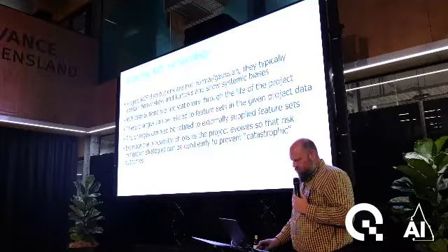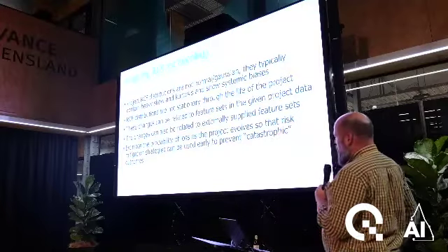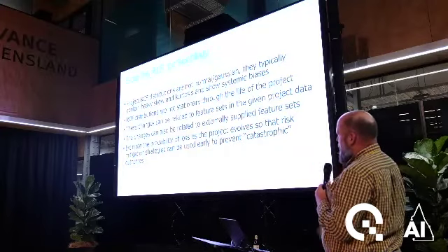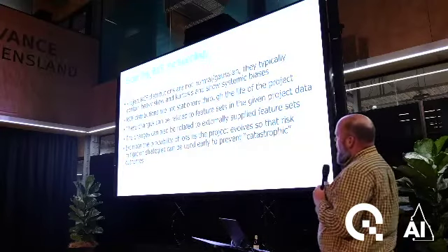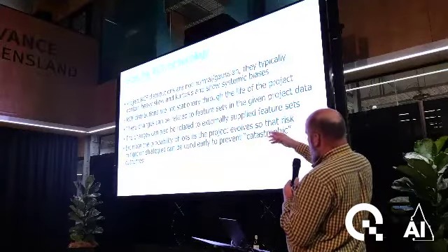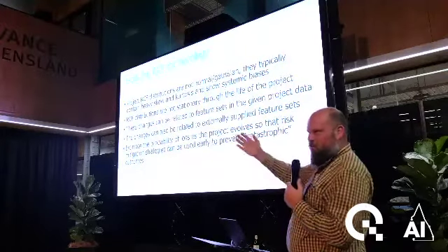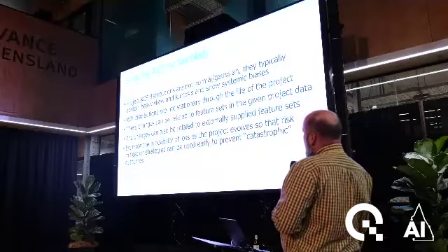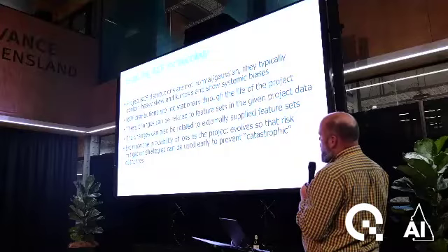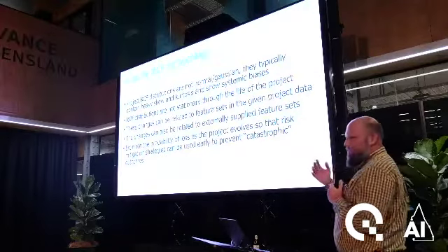All right, so with these companies that don't have large feature sets to help us model what's going on, we started extending the reference class forecasting methodology. Like I mentioned before, the distributions are not normal or Gaussian; they have heavy skew and kurtosis, and they show systematic biases in their forecasting techniques. But another issue with using reference class forecasting is that when we look at the historical data as you go through the projects, they're not stationary through the life of a project.